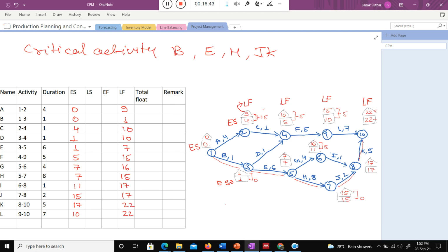So now the next point, if we know early start, then what will be the early finish of that particular project? The general thing, if we start the project at the early start time, it will be finished early. So how to calculate the early finish? Early finish is nothing but early start plus the duration of that particular activity. Here I write i to represent a particular activity. So early finish of a particular activity is the early start of that activity plus duration.